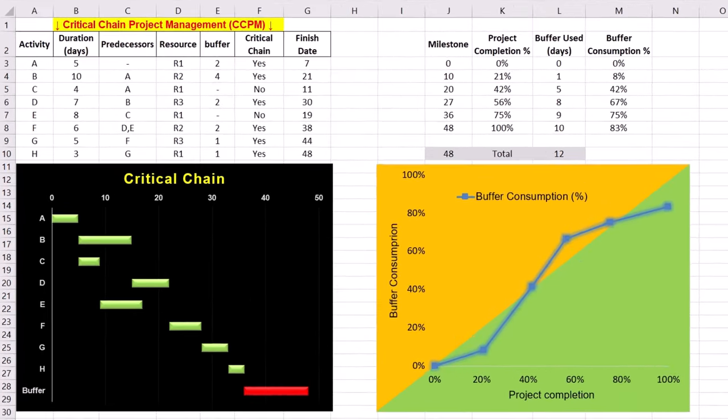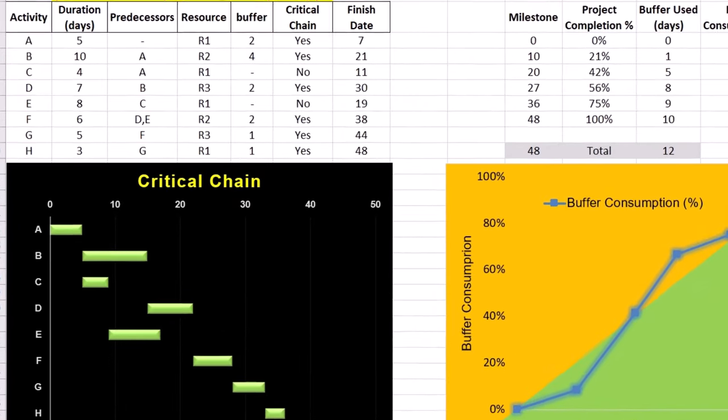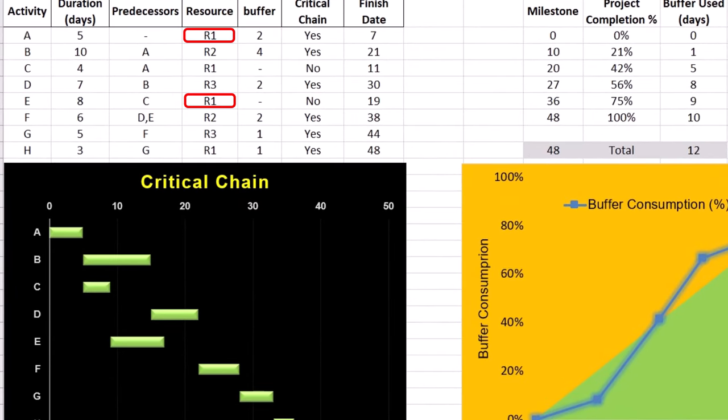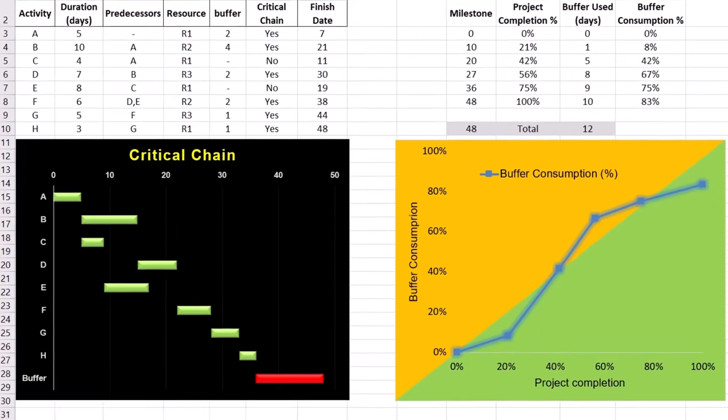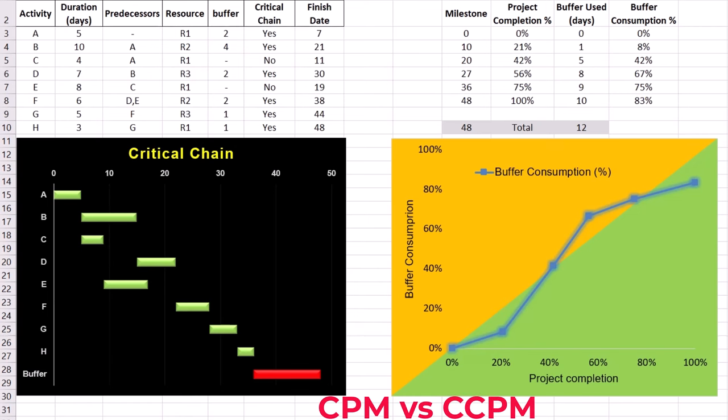Resource buffers ensure that resources required for activities on the critical chain are available. Resource R1 is used by both activities A and E, which could delay the start of subsequent activities if unavailable. Therefore, we can consider a resource buffer of 1 day before each critical chain activity that depends on the R1 resource. A resource buffer serves as a prompt to ensure resources are available and prevent bottlenecks without extending the project timeline. While the critical path identifies the longest sequence of dependent tasks, critical chain project management or CCPM considers resource availability and reduces inefficiencies caused by multitasking and other delays.